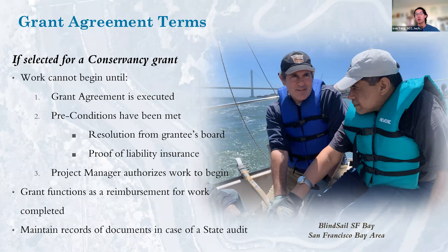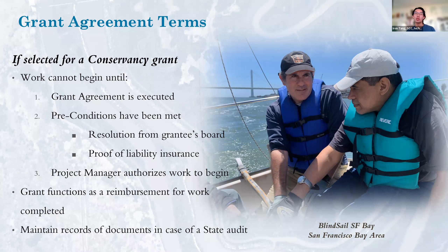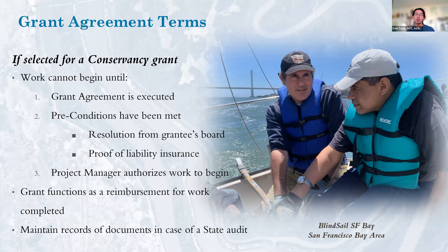Once the Conservancy approves grants at a public meeting, staff will prepare grant agreements setting forth the terms and conditions. The grantee must sign the agreement and comply with all conditions to receive funds. Expenses incurred before the grant agreement is executed cannot be billed to the grant. The Conservancy reimburses grantees for expenses after they are incurred, meaning grantees will need to cover costs between incurring them and receiving reimbursement. In some circumstances, grantees can receive funding in advance.